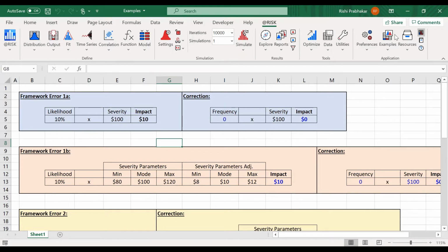Now, what's wrong in a model? What could possibly be a mistake in a model? Well, a mistake in a model is that the data produced when you run a simulation doesn't actually represent data that is indistinguishable from a possible future. That's a whole bunch of words, but basically what it means is that if you want to say you have a model and you want to run a simulation to get information about your exposure, you have to be producing outcomes that you are actually exposed to.